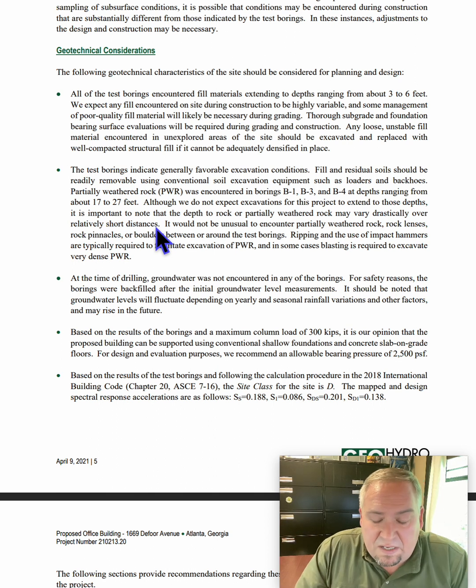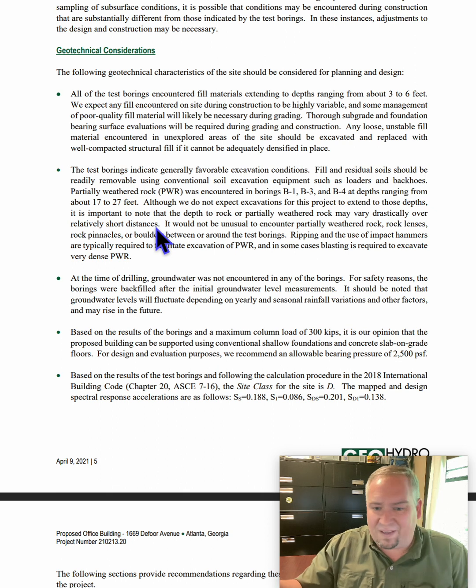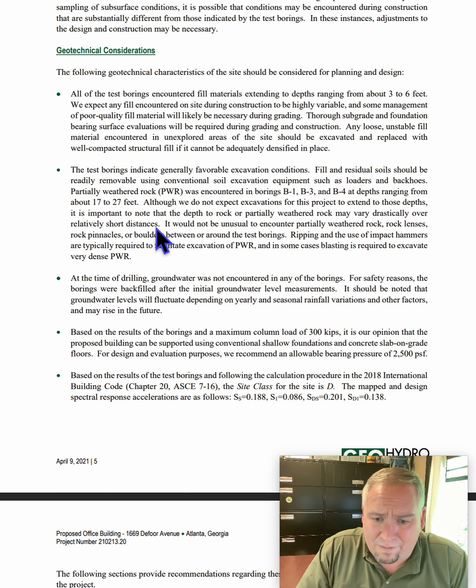The geotech can punch this thing like Swiss cheese, but the owners don't want to pay for 200 borings. We're just looking at reducing risk. We're not trying to eliminate it and spend all this money. So you can turn that thing into Swiss cheese, but it just doesn't make economic sense. So they're saying, hey, this is our best judgment here. We're trying to reduce the risk. This is what we highly likely think is here.